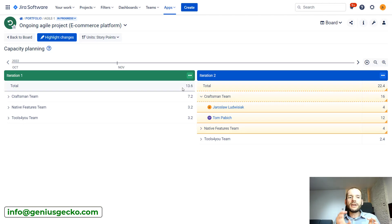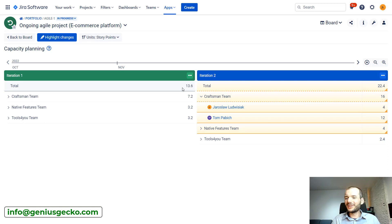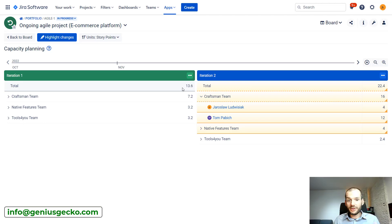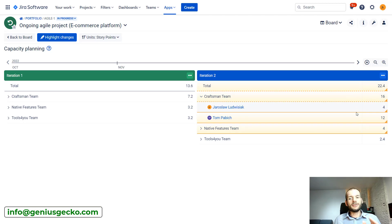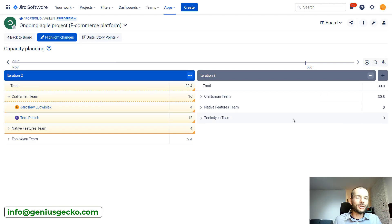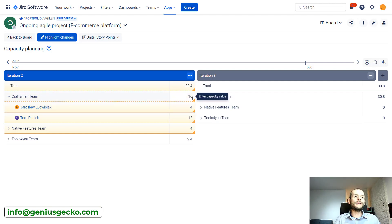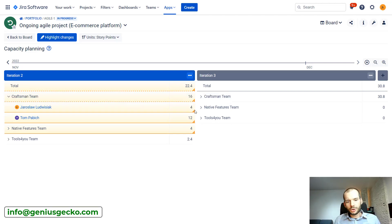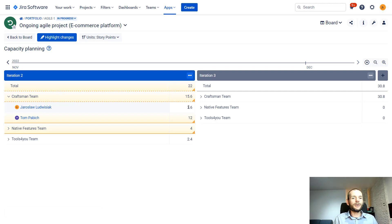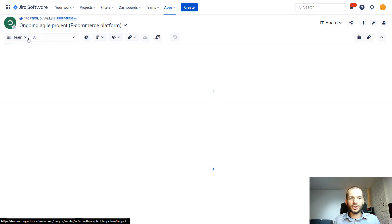From iteration to iteration, based on our team velocity and just on our awareness of what is happening with team, maybe some members are off. We can, from iteration to iteration, modify these values. But also if, for example, we change that because all of our team members were away and they returned earlier than we thought, or maybe there was a high risk they will be not available when we were doing the planning. That's why we decreased this value. But it turns out they will be able. We can pretty easily restore value to the one calculated by Big Picture. And yeah, live with that. Maybe do the re-planning or just start looking at another iteration.